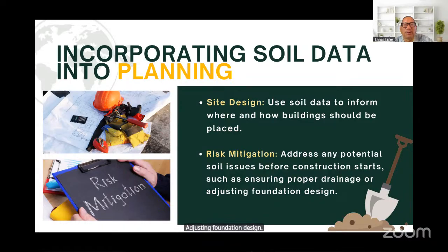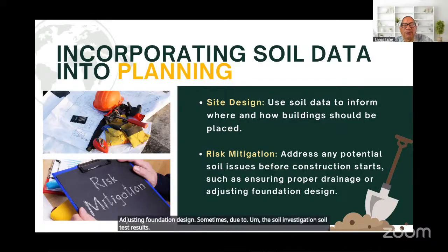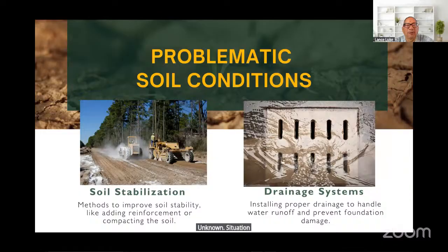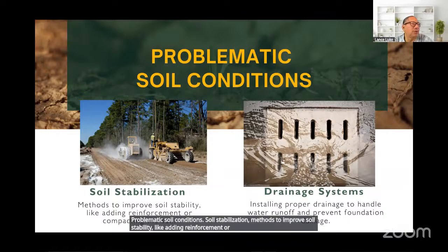Sometimes, due to the soil investigation and soil test results, the structural engineer has to change his foundation design to accommodate the information that was derived from the soil study. And sometimes the developers have to pay extra because these are unknown situations. Problematic soil conditions. Soil stabilization: methods to improve soil stability, like adding reinforcement or compacting the soil.